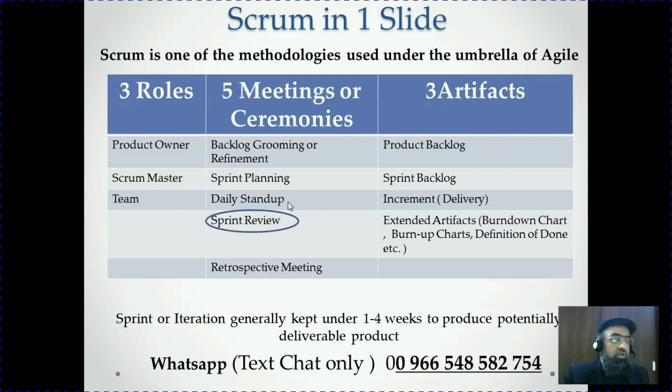That said, this is what we committed at the beginning of this sprint, and now this is what we have accomplished. So that is presented to the product owner, and if he is satisfied, he will approve those items individually, otherwise he can reject some of the items also. So the items he will approve will be removed from the product backlog, the items he rejects will be added again in the product backlog and maybe reprioritized in future sprints.